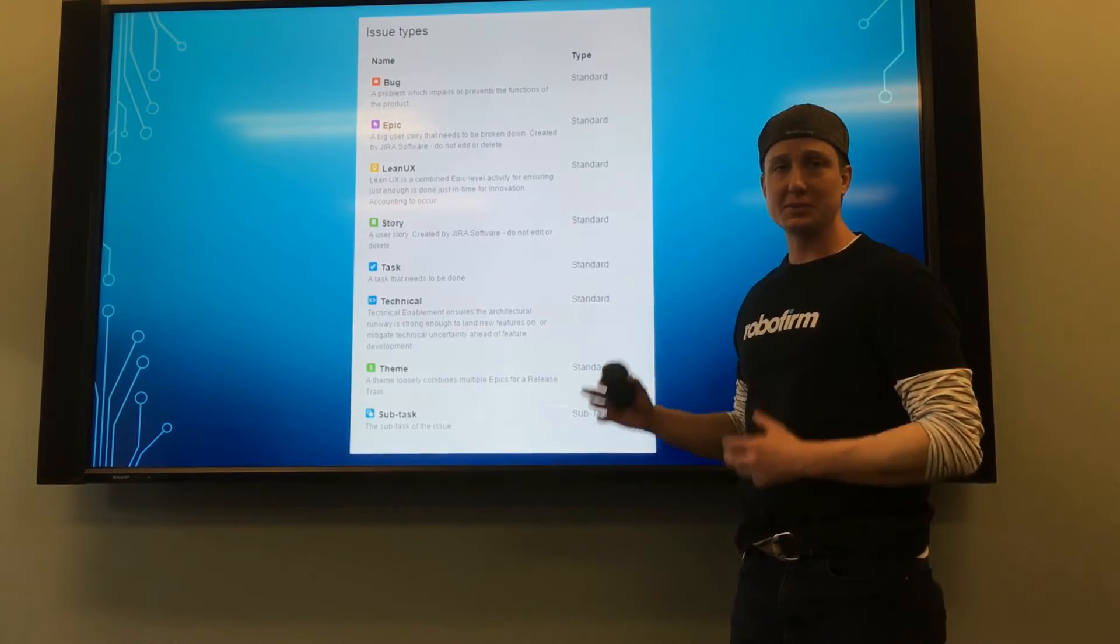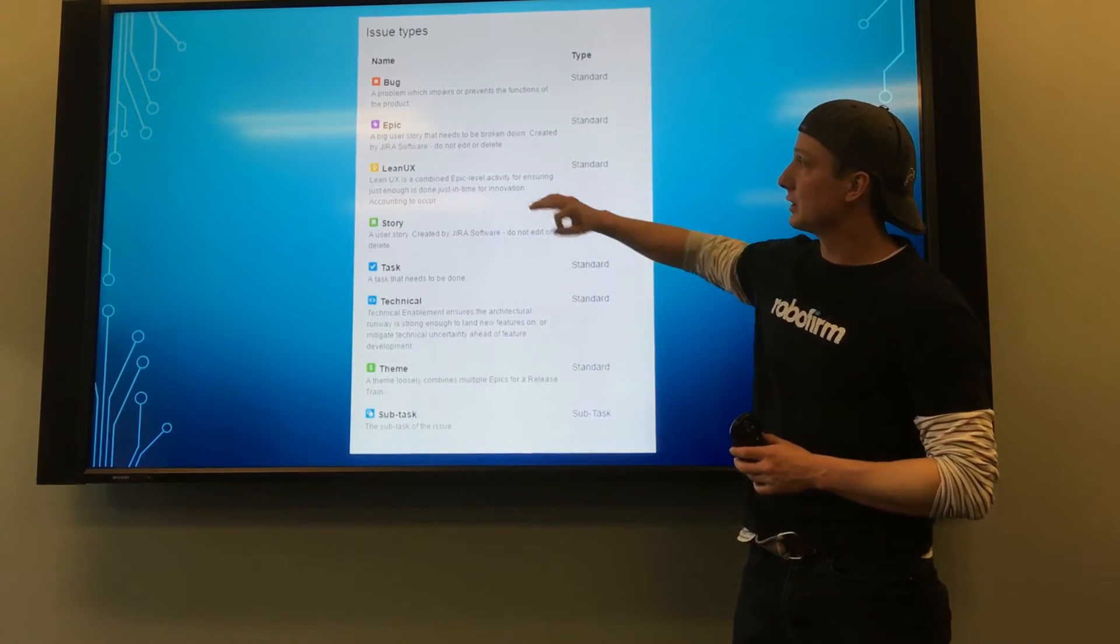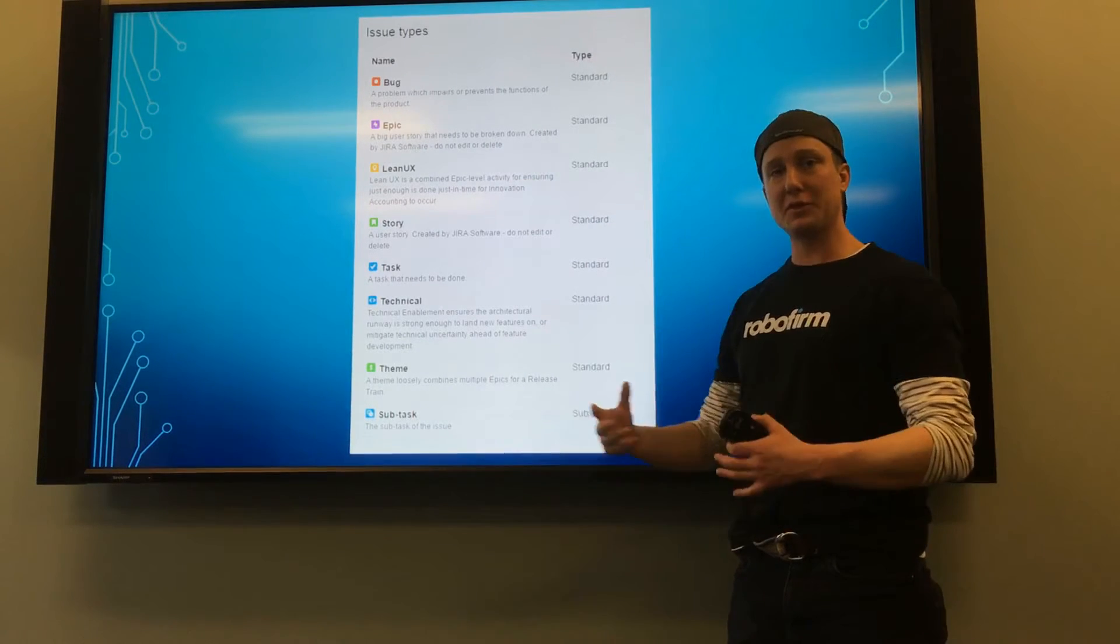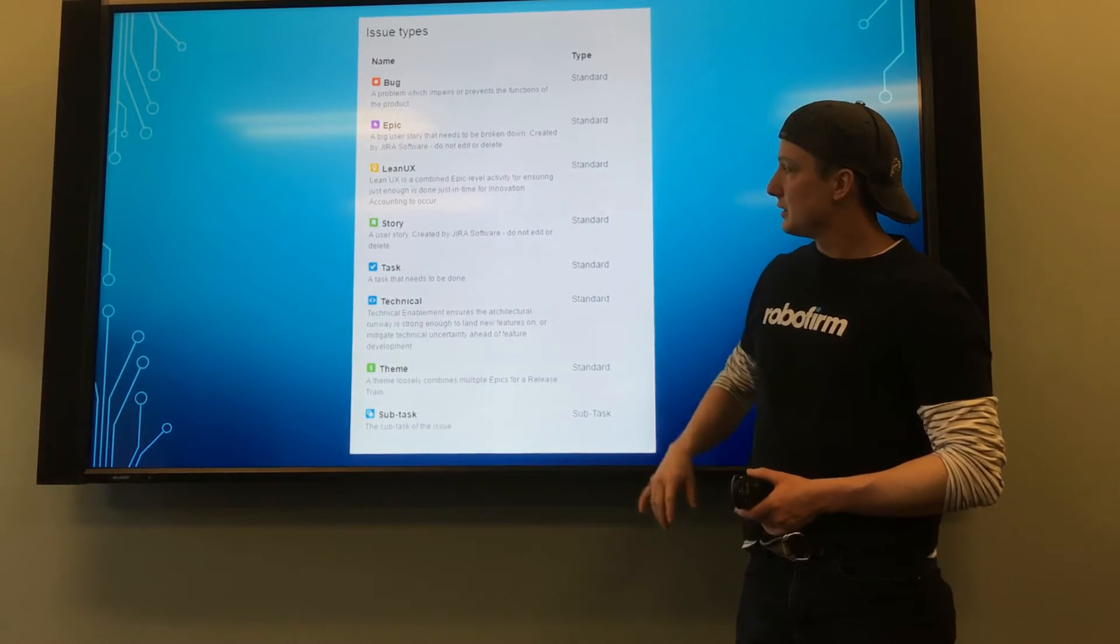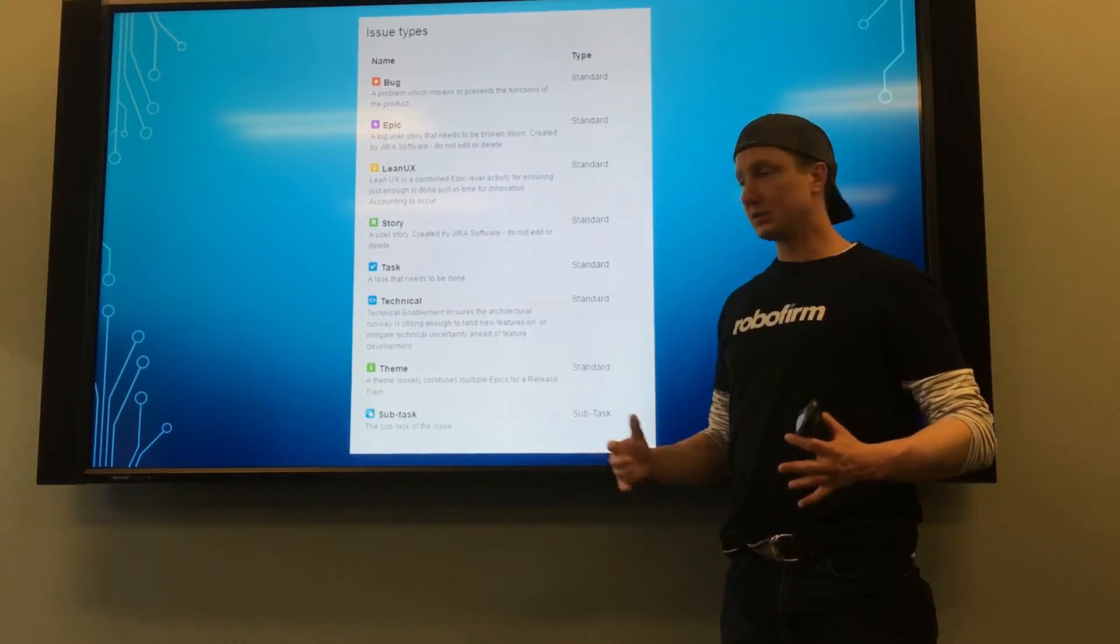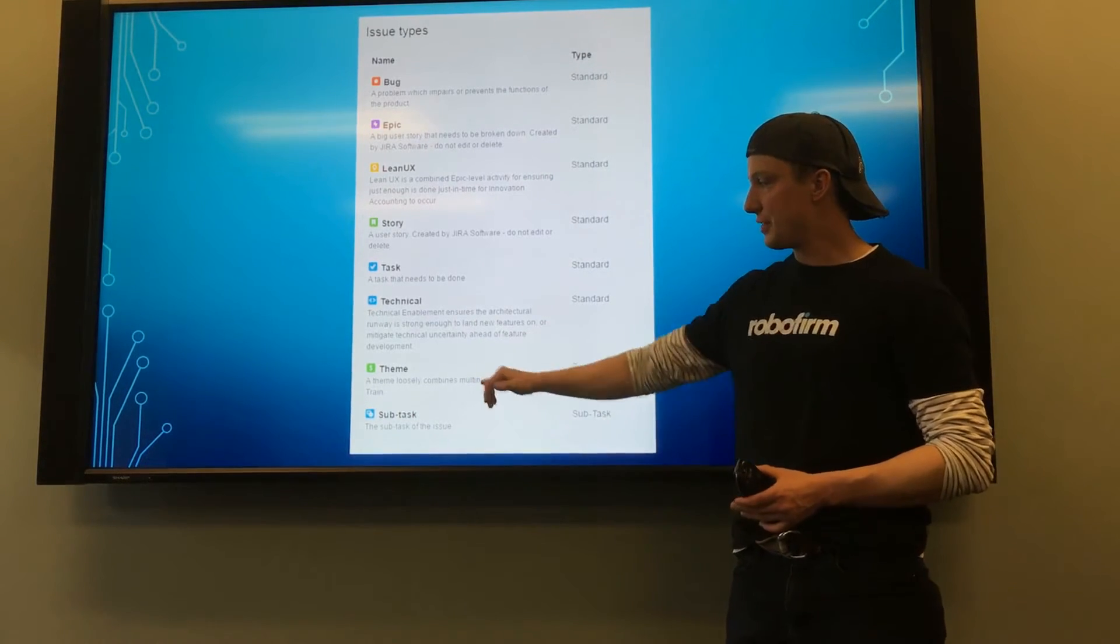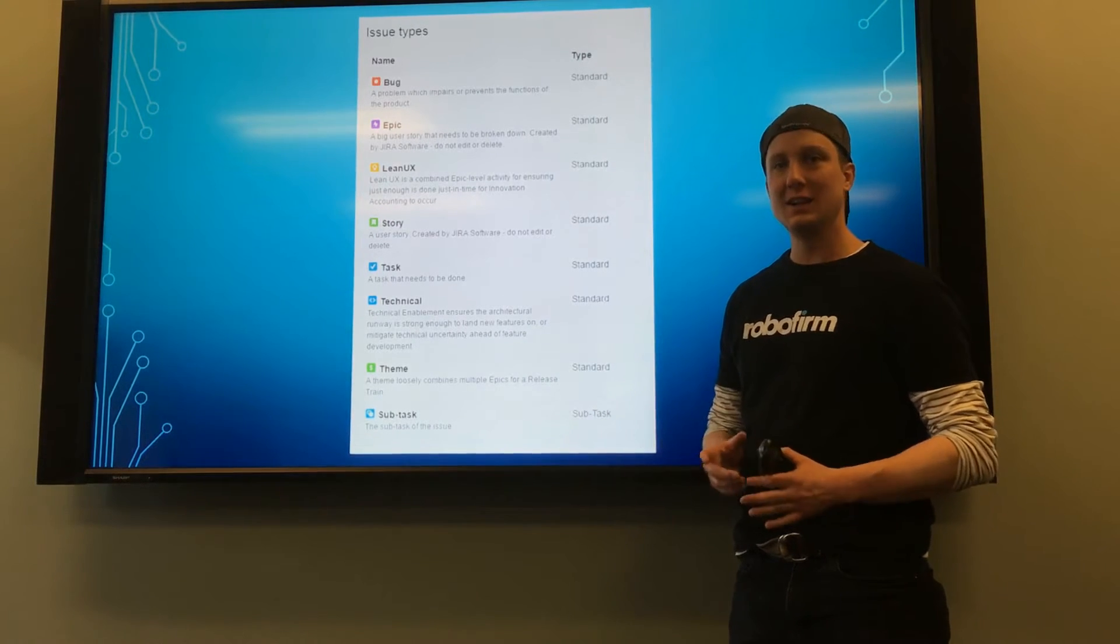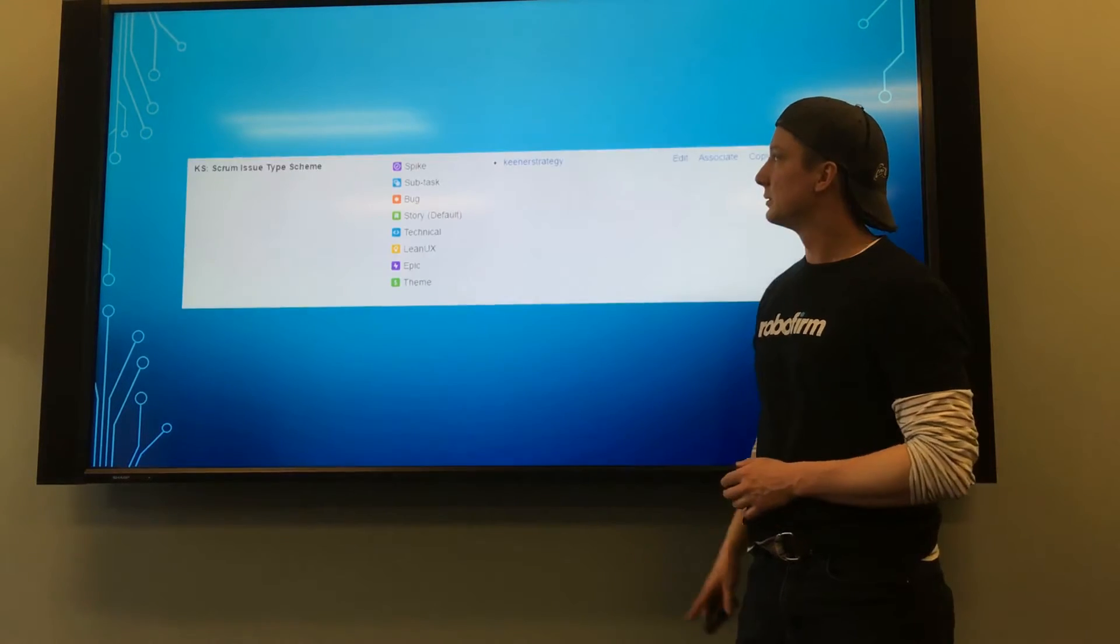First, I like to set up several different issue types, including a Lean UX card that follows a scientific method or innovation accounting workflow, tasks, technical cards for technical enablement, and of course, themes to help tie together funding buckets that span multiple epics.